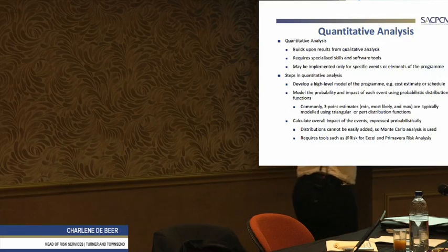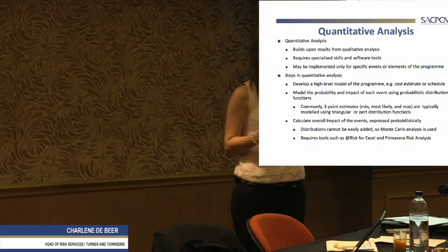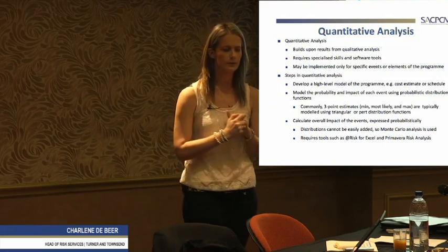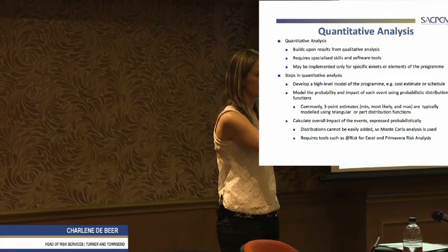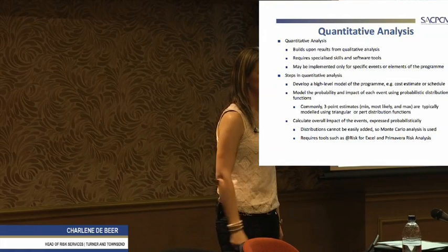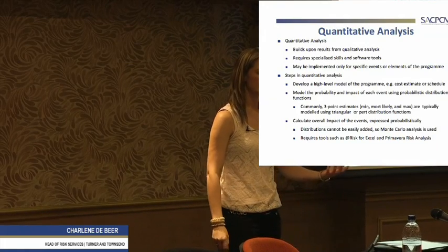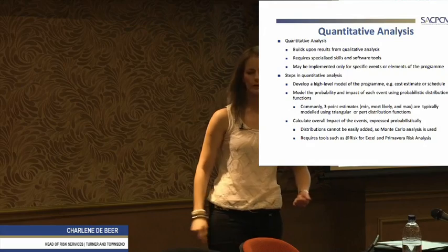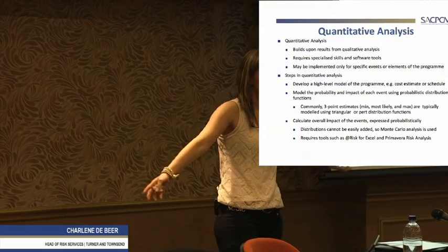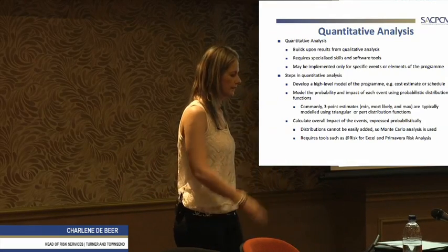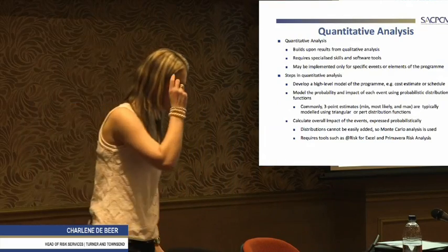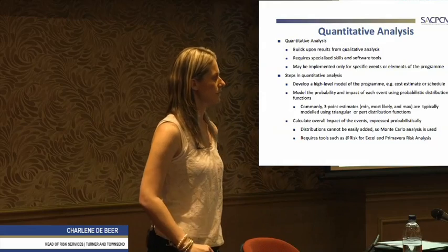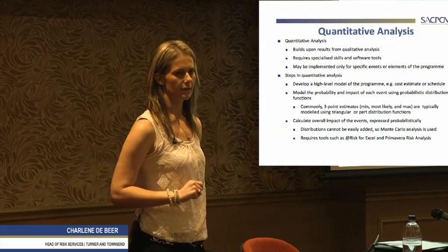The second risk register for quants, if I need to work out the cost, is I will say, if this risk happens and this is the likelihood, what would your impact or overrun on schedule be? If we talk weeks now, for example. He will tell me, well, it could be between 2 and 6 weeks. We're not quite sure. So let's peg minimum 2 weeks delay, most likely 4 weeks, maximum 6 weeks. And then I'll show you how we derive a cost from that as well.